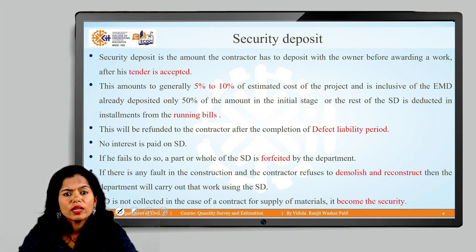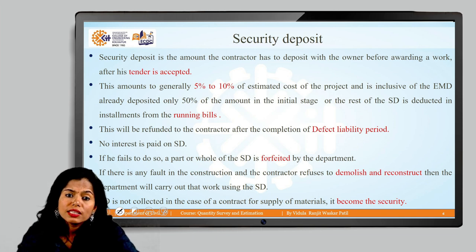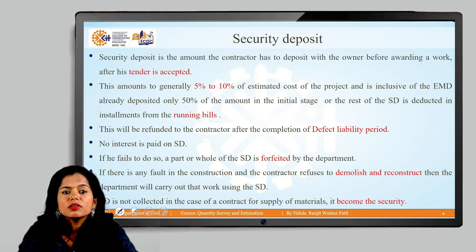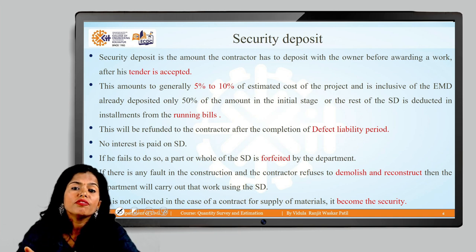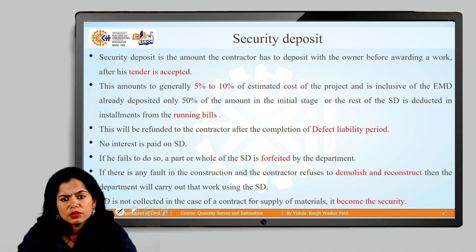For example, if the contractor's bill is one crore and the security deposit is 10 percent, then 10 lakhs is withheld with the department. This is collected through running bills — each monthly bill has 10 percent withheld. If the monthly bill is 10 lakhs, one lakh is withheld with the department.